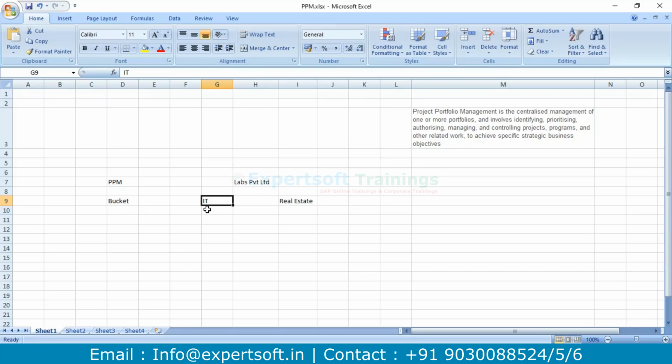But if it is C projects, you can create it in the investments as well as the item projects. Yeah, investment and item, sorry, not IT, item. Item is the last leg of your portfolio. That is called a portfolio project, where you do all the financial activities, meaning plannings, which you then transfer further to your lower level.